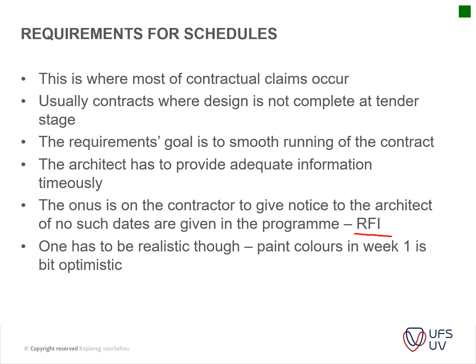One has to be realistic though. Paint colors can't be given 1 week within the contract. It's just a little bit too optimistic, but you need to timeously ask for your information so that you can still order your material in time.